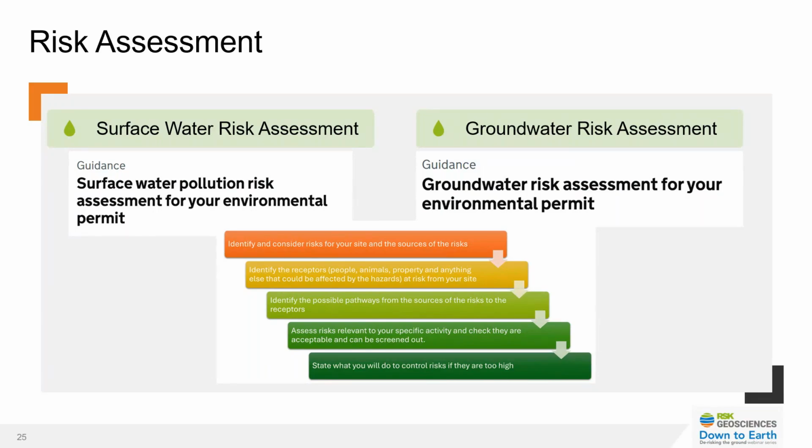It is possible that a greater level of surface water risk assessment might be required, so a full H1 environmental risk assessment, but this is likely to be primarily on contaminated or brownfield sites, or those sites that sit within 500 metres of a designated environmentally sensitive site.